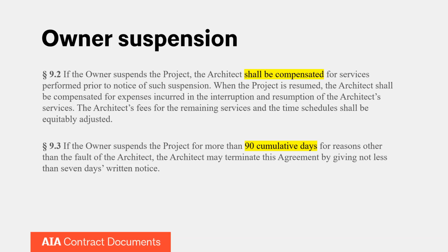and say, suspension is something that is not directly dealt with on some of the other AIA agreements, other than the B101. So for example, I know I was looking at the A104, which is the abbreviated contractor agreement, and it doesn't deal with suspension directly. It's one of the clauses that was taken out to make it shorter and more streamlined. So parties to various owner-architect agreements, owner-contractor agreements, etc., if they want to deal with these types of issues and they're not in the base language of their contract, like Mike has referenced a couple times, the ability remains for the parties to enter into a change order or to otherwise amend their agreement to include these types of provisions as if they were there the whole time.